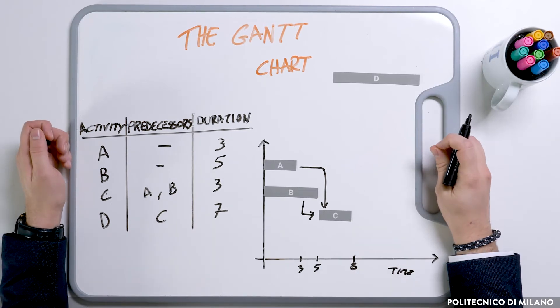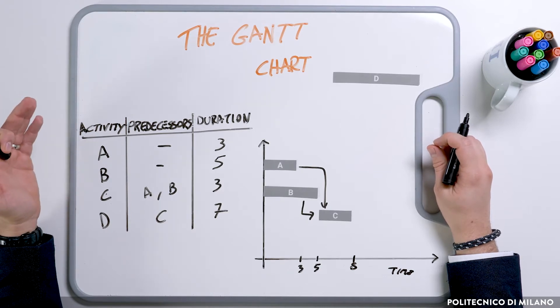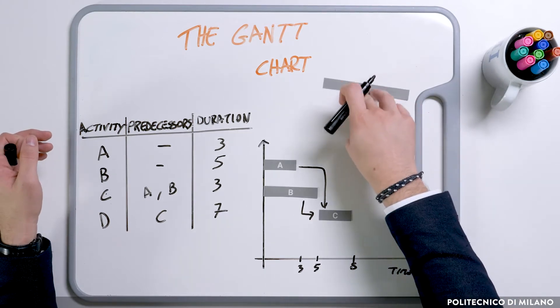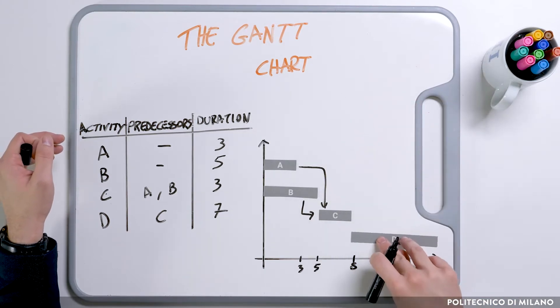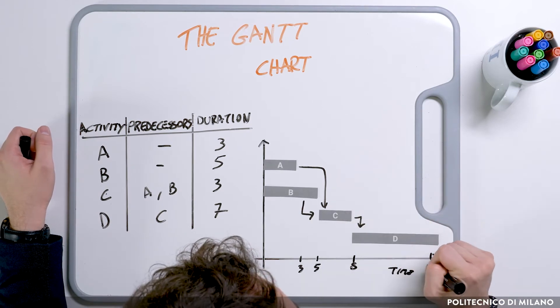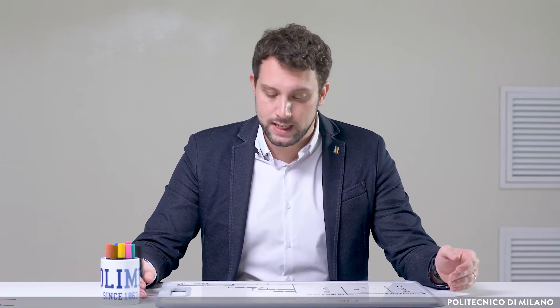Similarly, activity D cannot start before 8, since it needs C to be finished. Lasting 7, it will finish at 15. Even though the sum of the durations of all activities is 18, the project lasts 15, as you can see from the various activities overlapping on the Gantt chart.